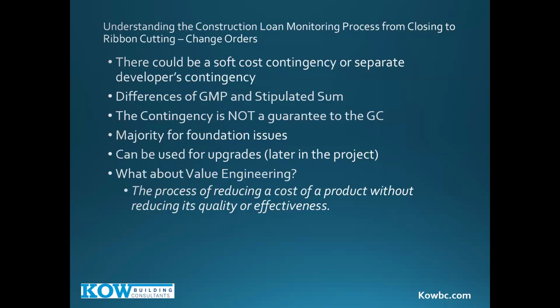That's value engineering. That's a really good example of value engineering. Not always available, but that was a smart way to do it, where the company said, look, we could save you some money because on the plans, we didn't know how many cameras we would need. Turns out we overemphasized, you're going to save some money. That was a good value engineering piece without a reduction in the quality.